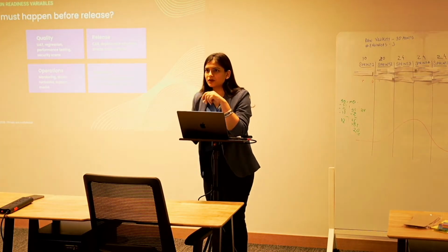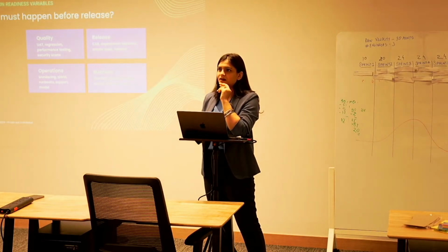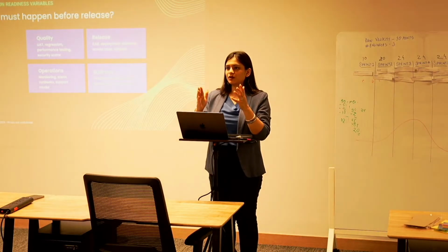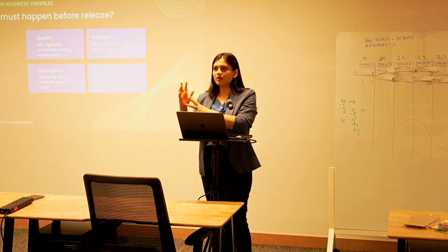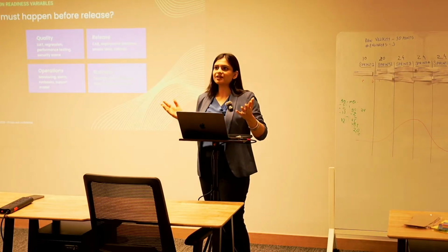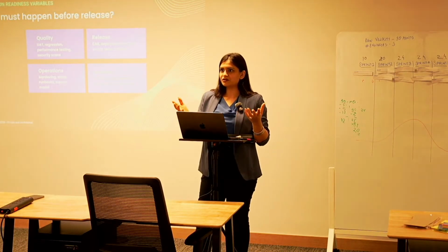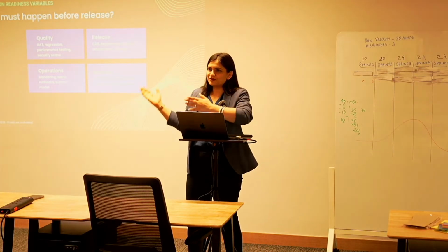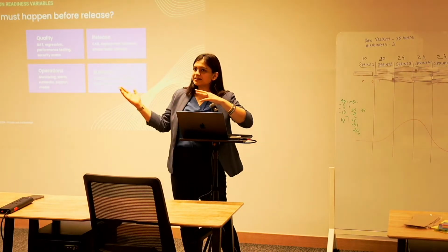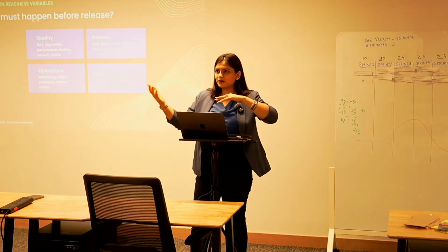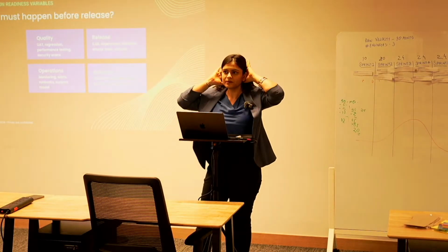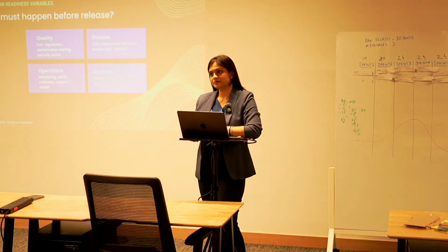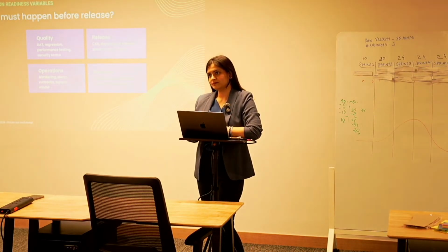That's very right. And I think what you're talking about is definition of ready in our language, right? So when do we say this feature is ready? When it has gone through a cycle of testing, when it's been validated across all the edge cases, stuff like that. So that's definition of ready. But I think another question to ask on top of that is whether it is going to be usable by the clients, right? So maybe we release it in production, but we toggle it off, or we don't launch that. Yeah, FNF is for clients only. Correct. They can do the onboarding in the production environment only.